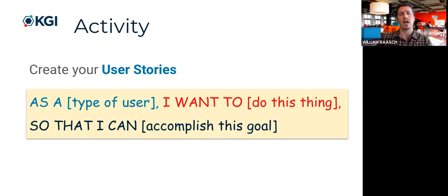And so you show, well, what happens if we take our knowledge of what the range of the test should be to help autofill what they're inputting, or maybe automatically do calculations for them. So that way you can pick a very small part that maybe you think is the biggest user story pain, and then run that by those users and see, okay, would this be helpful to them? And if so, you've got something that's worth continuing to build upon.